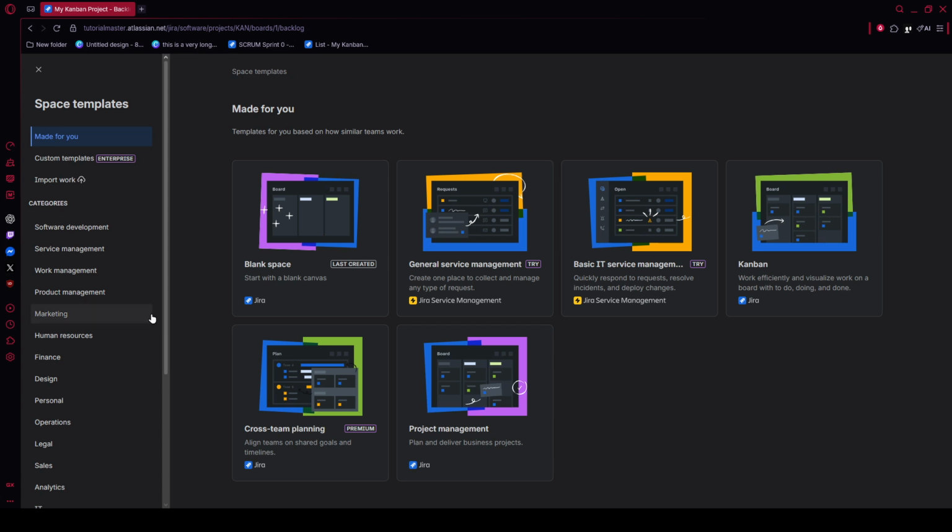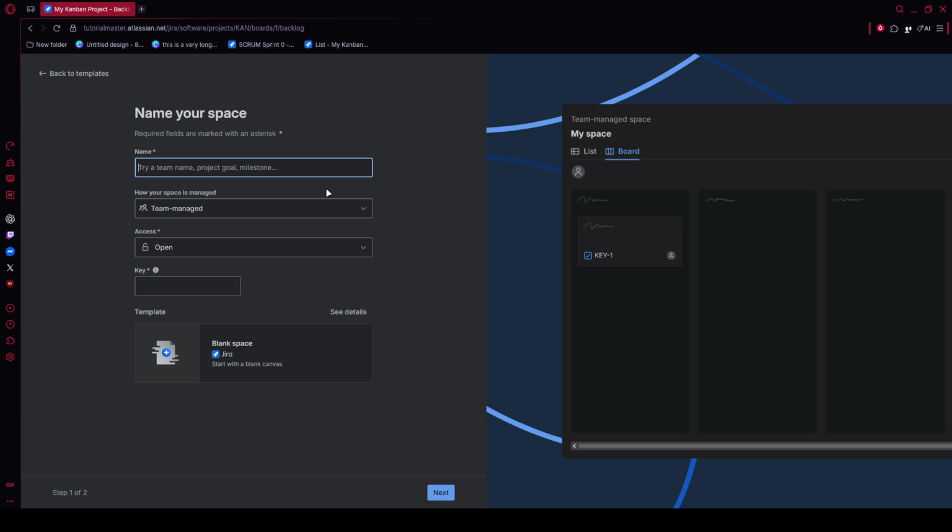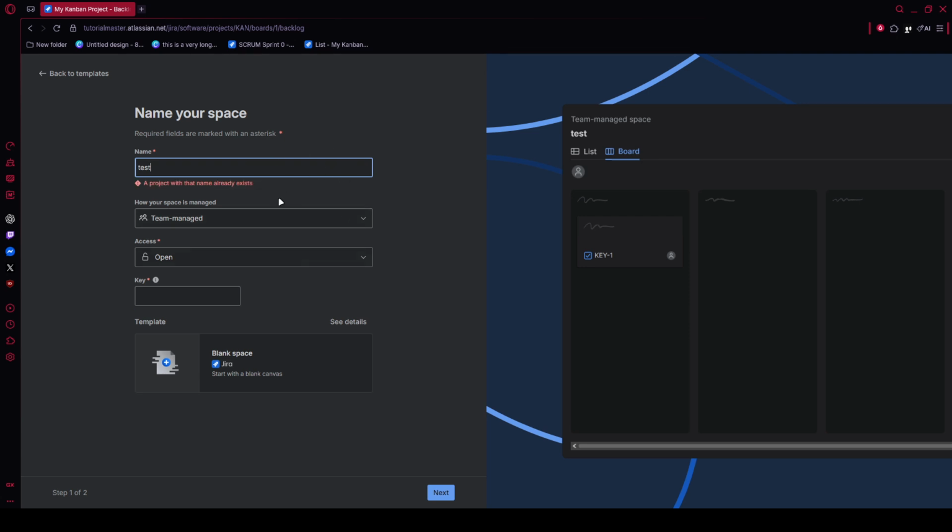Once the summary is in place, scroll down to the description field and add the details your team needs. This is where you can explain the scope, provide context, or describe the problem clearly. Then continue filling in any relevant supporting fields such as priority, sprint, or fixed versions, and assignee, depending on how your team organizes work. Before submitting anything, take a final moment to review the form.